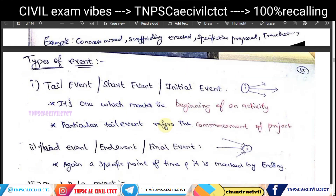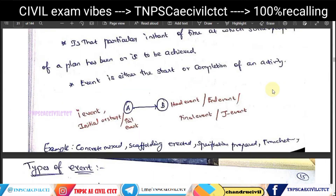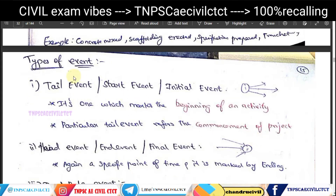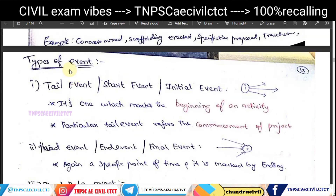Examples of activities include concrete mixing, scaffolding, and specification preparation. Examples of events include: concrete mixed, scaffolding complete, and specification prepared. There are a total of five types of events.